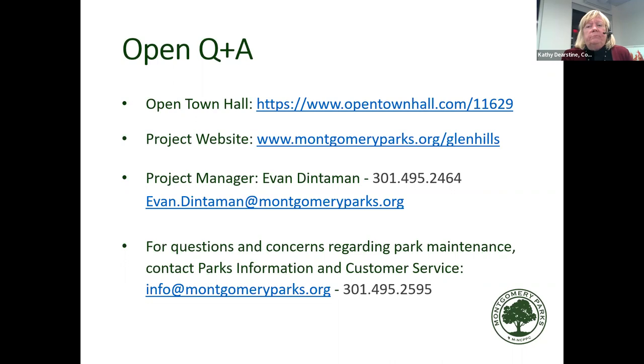Yeah, about that. So Greenbrier was definitely a higher cost playground because we did have a multi-million dollar project to renovate the park. So we had more money to spend and we had more space. And I think that one did have grade changes, so it was tying that into the structure as well. So it was a little bit more complicated site as well. But, like Kathy said, we can get some of those functions in lower cost equipment.